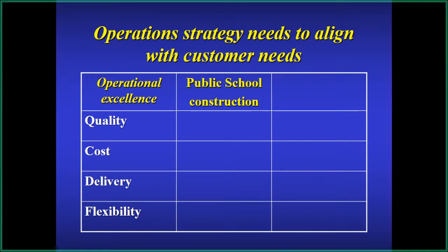I get a lot of friends in construction. They'll say, if you can't have the new school open or refurbished or whatever you're doing by September 1st, you're not eligible to bid. The school, you can't finish up like in January or February the way you can in some other things, because the school needs to be open. So delivery becomes the number one issue. If you can guarantee delivery, then you start to look at other things.